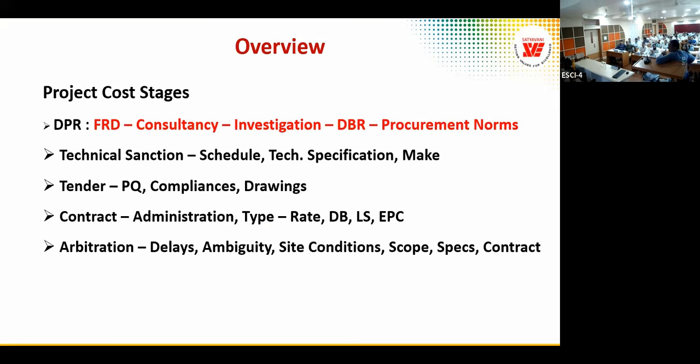In arbitration, we had many projects with delays due to site handing over or neighbors' encroachments into the site, even defense lands. We had issues of site handing over and ambiguity in the contract and site conditions. Site conditions are unexpected because the DPR would have been prepared some 3 years back, and in 3 years some changes would have happened in the site. In one of my project sites, there was a quarry actually.